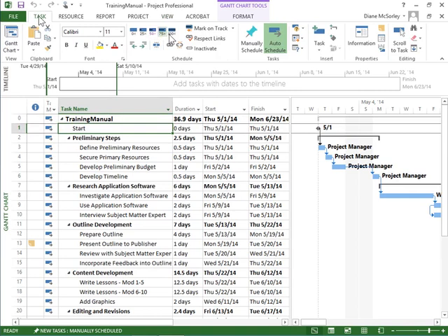So if I give a click, it'll mark the task 100% complete and give me the check mark. Pick a task, mark it 100% complete. Now before I hit this button, I want you to take a look at the Gantt bar and see how it looks, blue box. When I hit the 100% button, you'll notice that it's still a blue box, but it gets a line straight through it, 100% of the way through it, to let us know we are 100% complete. If I marked it 50% complete, the line would only go 50% of the way, and we get the check mark on the left. This is all fine and good.